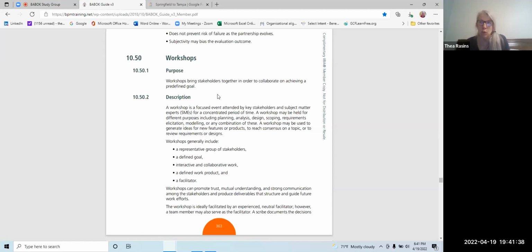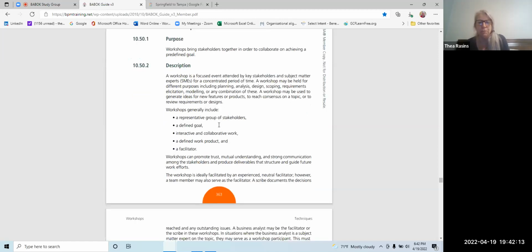That way they don't spend the rest of the workshop thinking, I bet they're not even going to listen to me. I bet it's going to be forgotten. It's going to be thrown away at the end. Don't let them do that. Talk about it and get it scheduled right then. When can we talk about it? Who else needs to be involved? What are the ramifications if we have to push it out? Get that information. And is there any documentation you can send to me about this so that I can understand it better before we have this meeting? So take care of your parking lot issues. What that does is it allows those people to focus on the rest of the workshop and be more engaged.